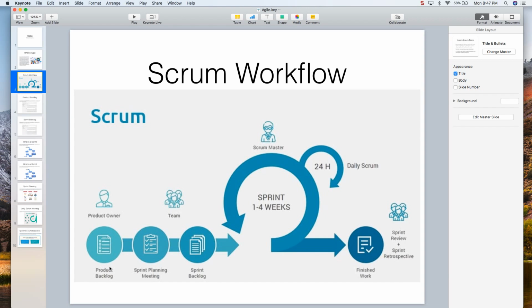It's where you store all your requirements that need to get built through the next 3 months or 6 months or whatever the duration of that specific project. Then you go into the sprint planning meeting, right? We'll talk about what we do in sprint planning. Pretty much you just decide what are we going to work on in the next 2 weeks. Based on what we decide, we grab those requirements and dump them into the sprint backlog. The sprint backlog is what we're going to be working on in a given sprint, and the product backlog is the entire project requirements that we have to do.